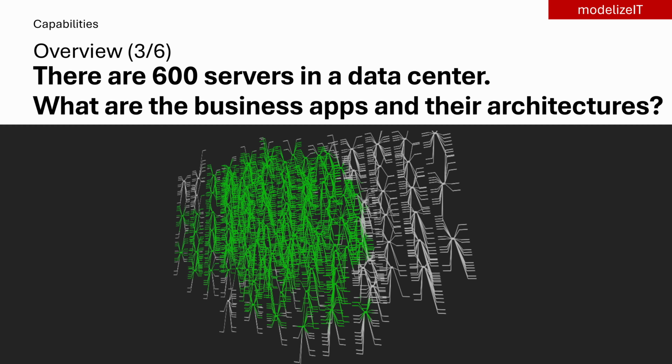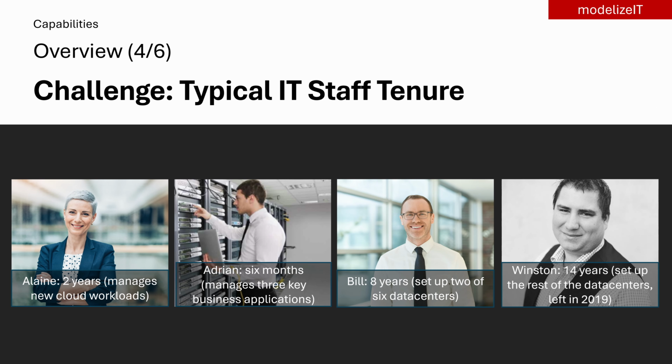Clients migrate business applications such as payroll, email, and expense reimbursement, not servers. So, to plan a migration, one first needs to identify and understand the architecture of all involved business applications. Once you start working on understanding client applications and begin planning their detailed migrations, you quickly realize that you're relying on client IT staff knowledge and availability. This creates a bottleneck. Progress depends on scheduling interviews, finding the right subject matter experts, and validating information that is often incomplete or outdated. As a result, early momentum often slows into a long discovery process before migration teams can confidently finalize application waves and dependencies.